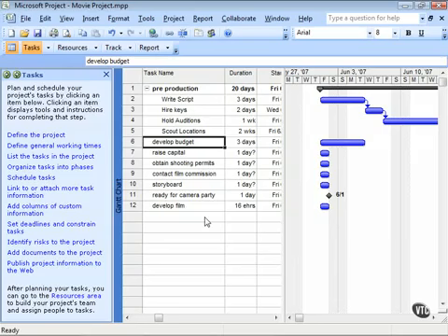So as we wrap things up here, we've created some finish to start relationships, which again is going to be the default. We've defined other types of relationships. By the way, the start to finish relationship, the one I mentioned, is not going to be used that often. It would be used in a case where something becomes available and that availability defines when the other one ends. Maybe you have just a planning phase and it's going to end when the work actually starts. That's the only time you'd maybe use a start to finish relationship, but again, to define a hard relationship between two tasks like that, it's going to be rare.